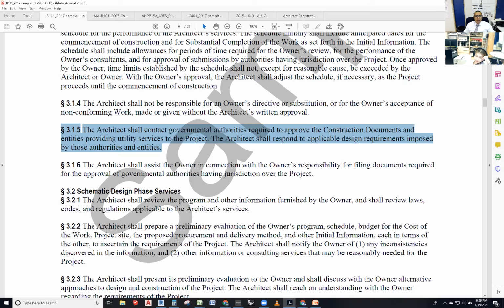And sometimes I play dummy and say, I just have a curiosity. So you are using the 2015 IBC. Are you also using the stretch code? In Massachusetts they have the stretch code. Every municipality could have changes to the code that they want to make. So there's the Mass state code, and then there are the actual local municipality changes to the code. So you want to make sure that you don't rub them the wrong way, and ask them.